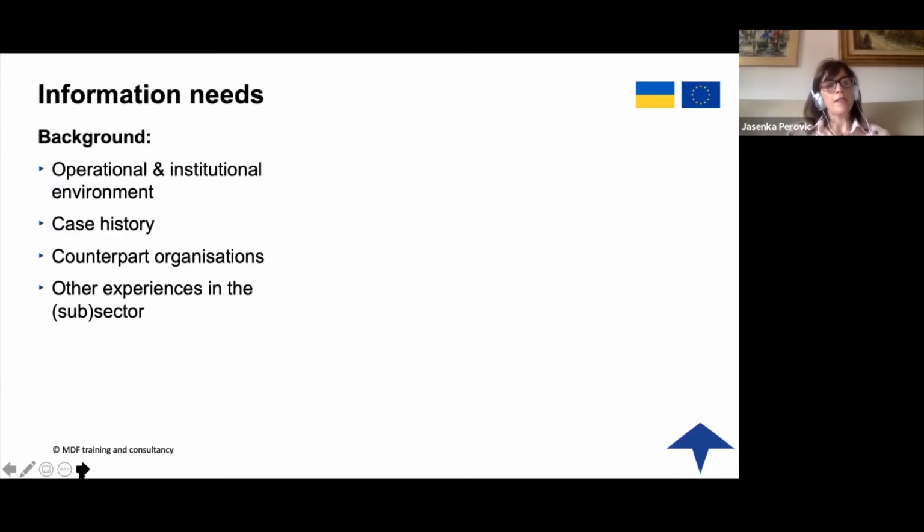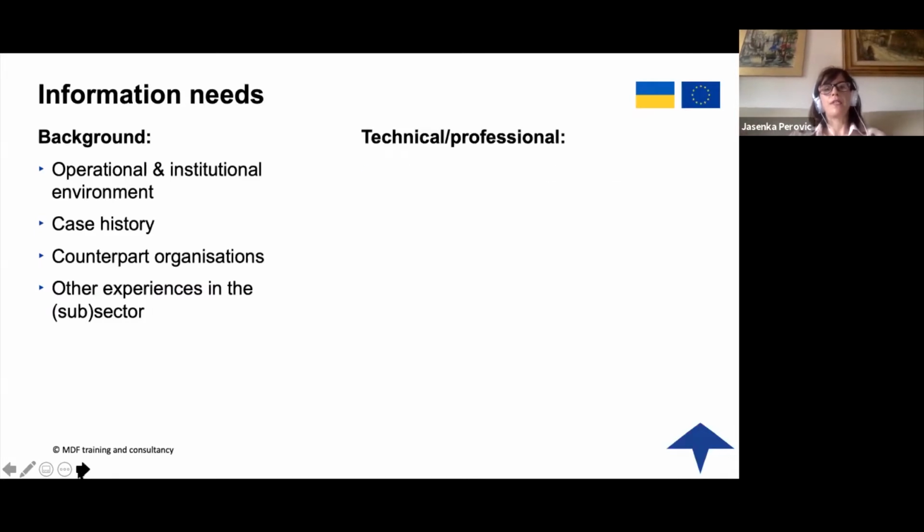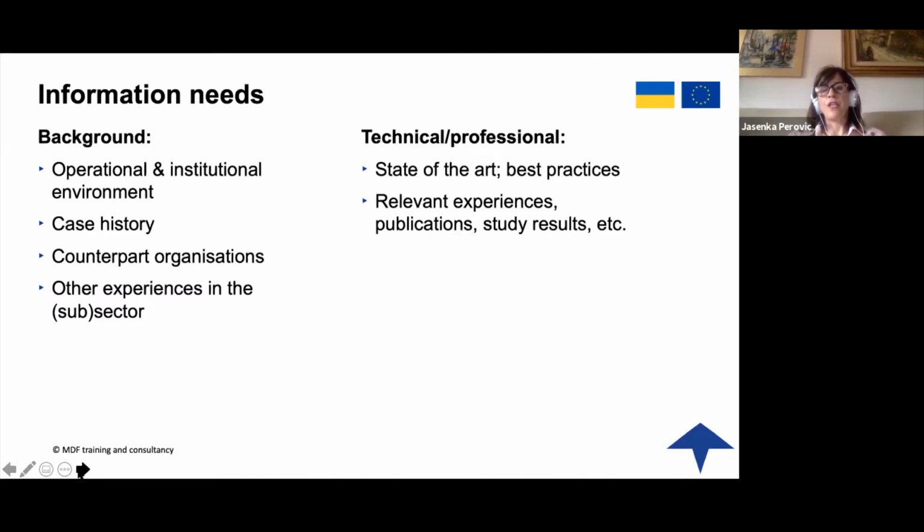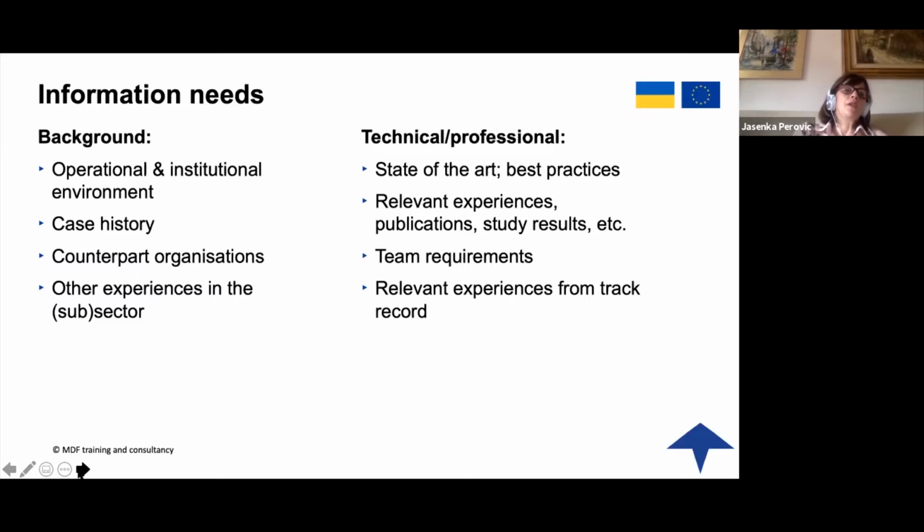Before going to the analysis, there is some information that you should try to collect. This is the background information: operational institutional environment, case history, counterpart organization, other experiences in the subsector or the sector, technical professional state-of-the-art, best practices, relevant experience, and publications. So try a desk study, or perhaps because you are already so active in these sectors, you will have a good understanding of all of these elements listed here.